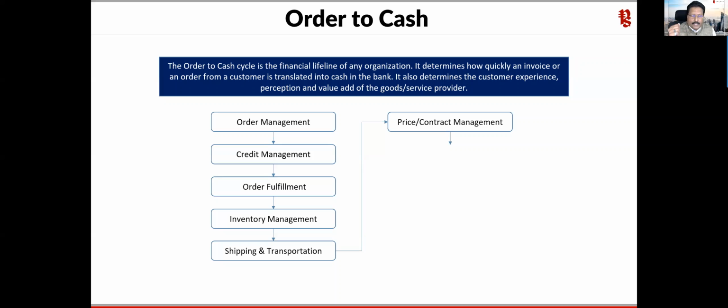So what does it mean? It means that the rate we have fixed is 100 rupees, right? Let's take an example that there is a sub clause which says if there is a price escalation or de-escalation of 10%, then we will relook into the agreement. That is one aspect of it. The other aspect is that until and unless the agreed standard price changes by 10% or more, if it is less than 10% escalation or de-escalation, the supply will be made at the agreed standard rate.